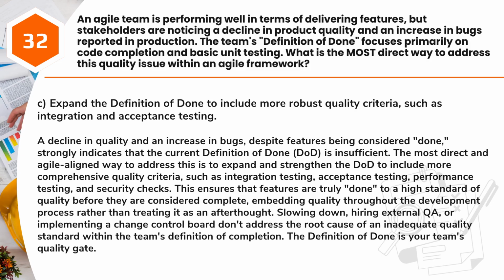Answer: C. Expand the definition of done to include more robust quality criteria, such as integration and acceptance testing. A decline in quality and an increase in bugs, despite features being considered done, strongly indicates that the current definition of done, DoD, is insufficient.